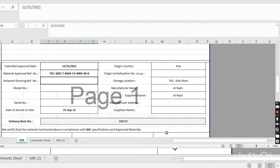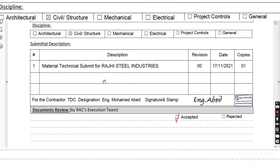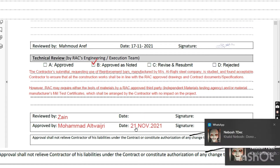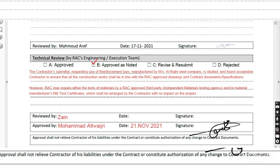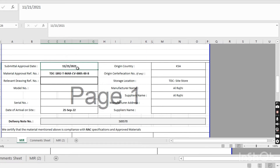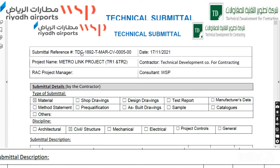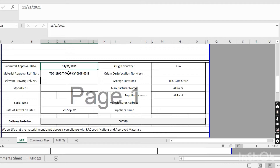This is the submittal approval section. Here is the MAR for the steel material technical submittal — submitted for Raji Steel Industries, accepted code B. You take the approval date from the MAR document — 11-21-2021 — and put that date here. This is the MAR number (TDC...). Every document has a number; from here you take the submittal reference number and document number and put them in the MIR form.